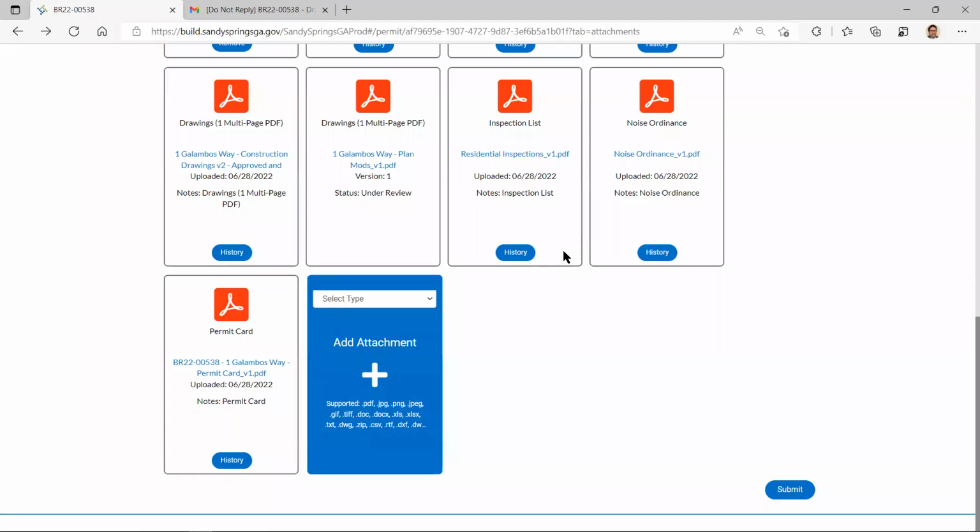The general rule is that basically all new construction is usually going to require an as-built drawing, as will any type of addition or alteration, any project within 5 feet of a setback, or any other unique circumstance, such as being near any type of easement or water setback, or maybe you have a septic system already there that you have to stay away from. If you have any conditions like that, usually if you're within 5 feet, then you're required to get an as-built survey.